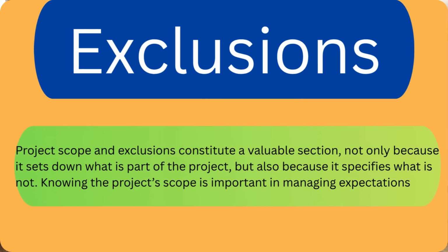The project scope is important in managing expectations. A list of what is in the project isn't necessarily enough, and at the end of the business, users can be disappointed because we haven't included something that the business area was expecting. So you'll find that most of the requirements might be missing. These exclusions aren't the whole planet outside the project, but rather those areas where misunderstandings may occur. During the project startup phase, it is very, very important to specify what the project is including and what the project is excluding. This is very, very important.